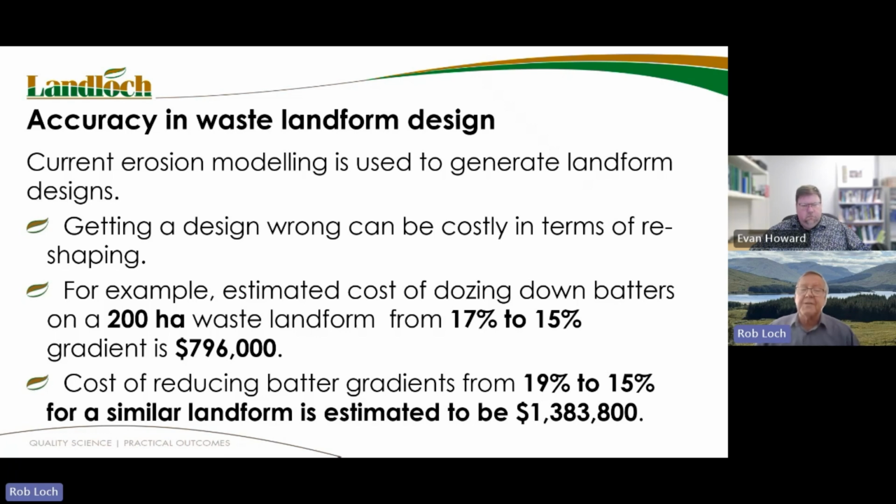Estimates from 3D data, for example, suggest that for a 200 hectare waste landform, if we decided our batter gradients were wrong by 2% and had to doze down from 17 to 15%, that'd cost nearly $800,000. And if in fact the difference was 4%, you're getting well over $1 million, 1.383 million.